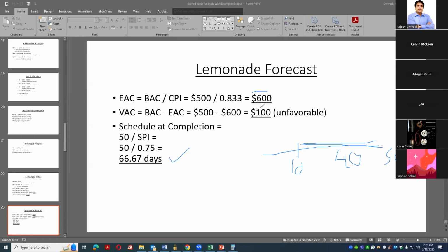Any project management software, like Microsoft Project, gives you the planned value today and the earned value today, and from accounting you can see the cost spent so far, so you can see whether it is going on budget and on time, and how many days.